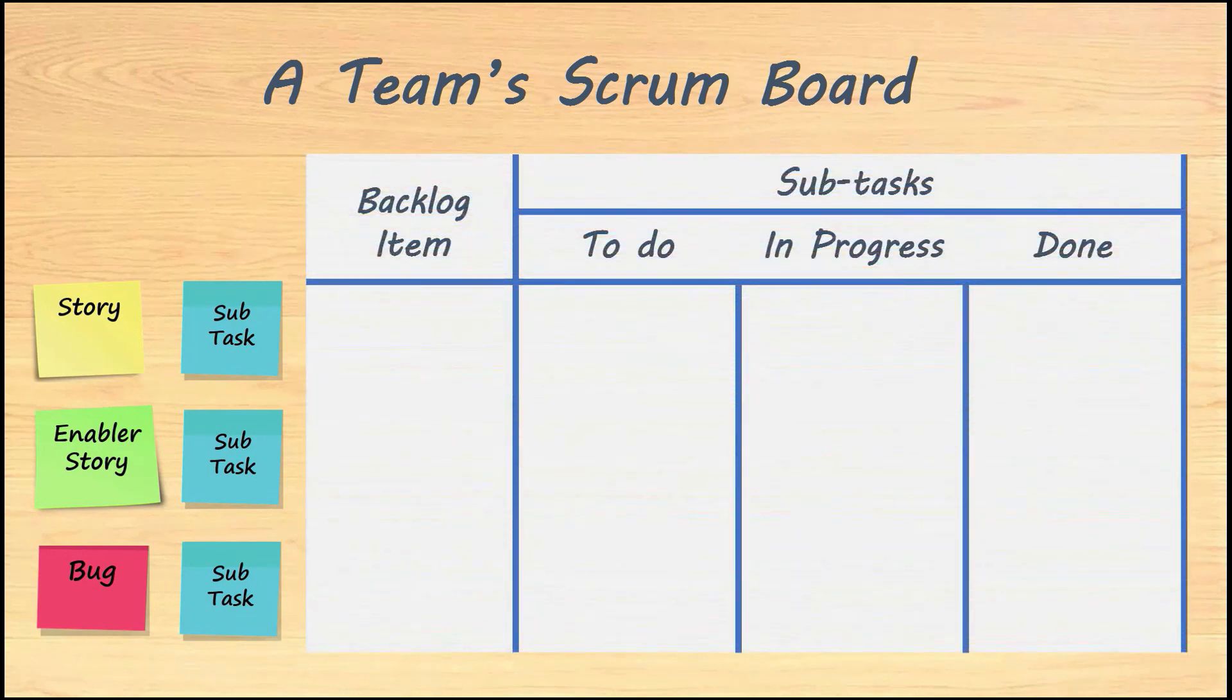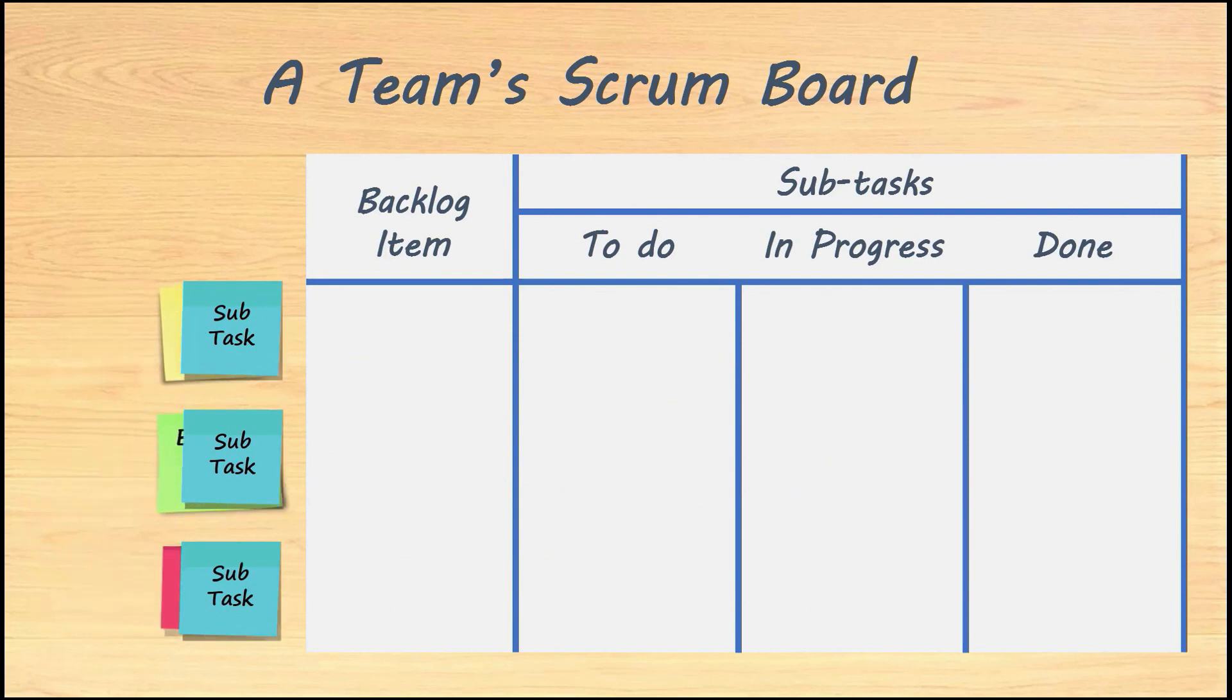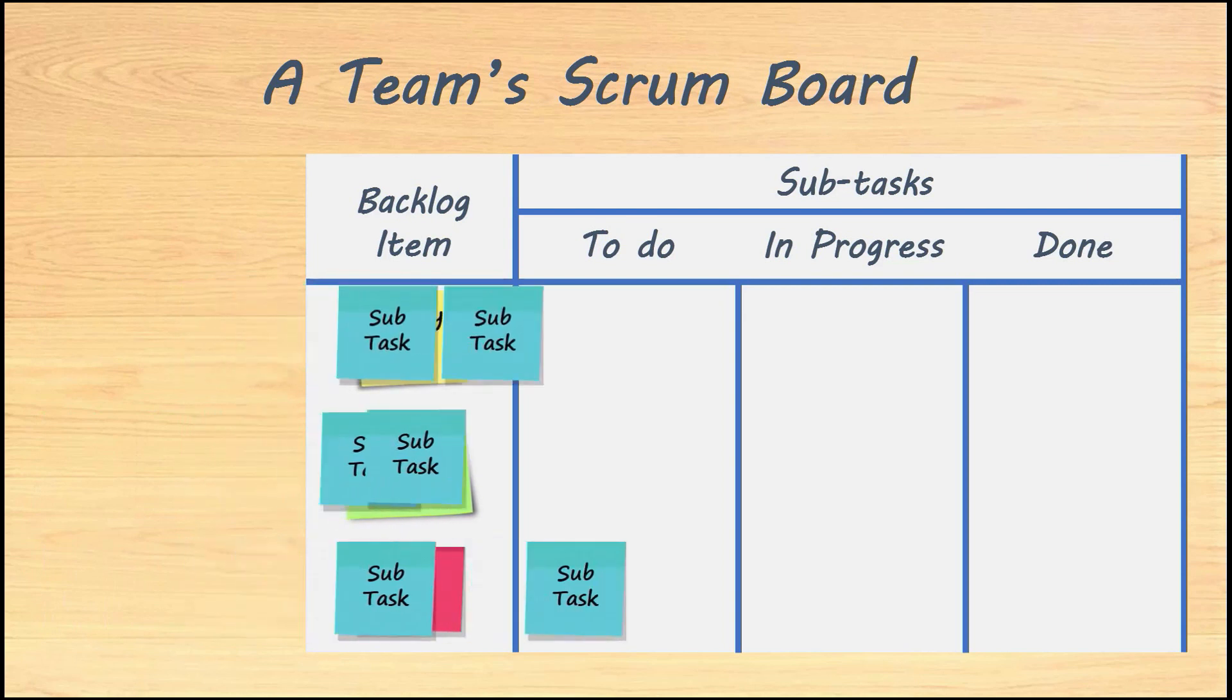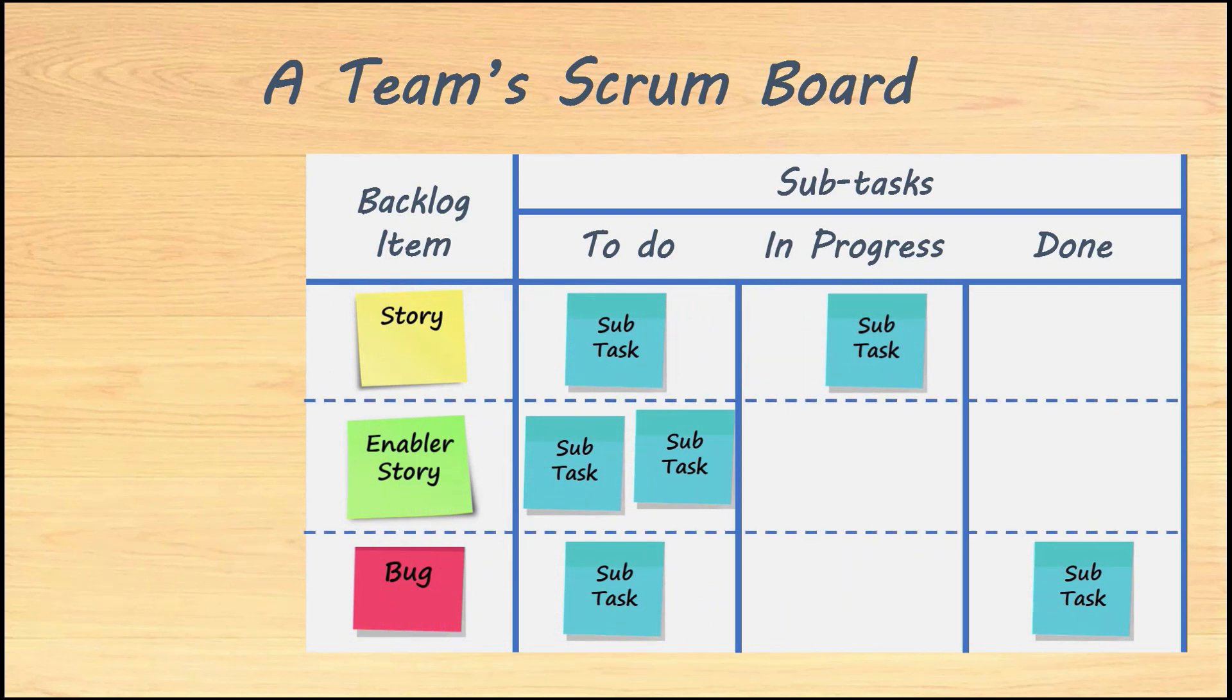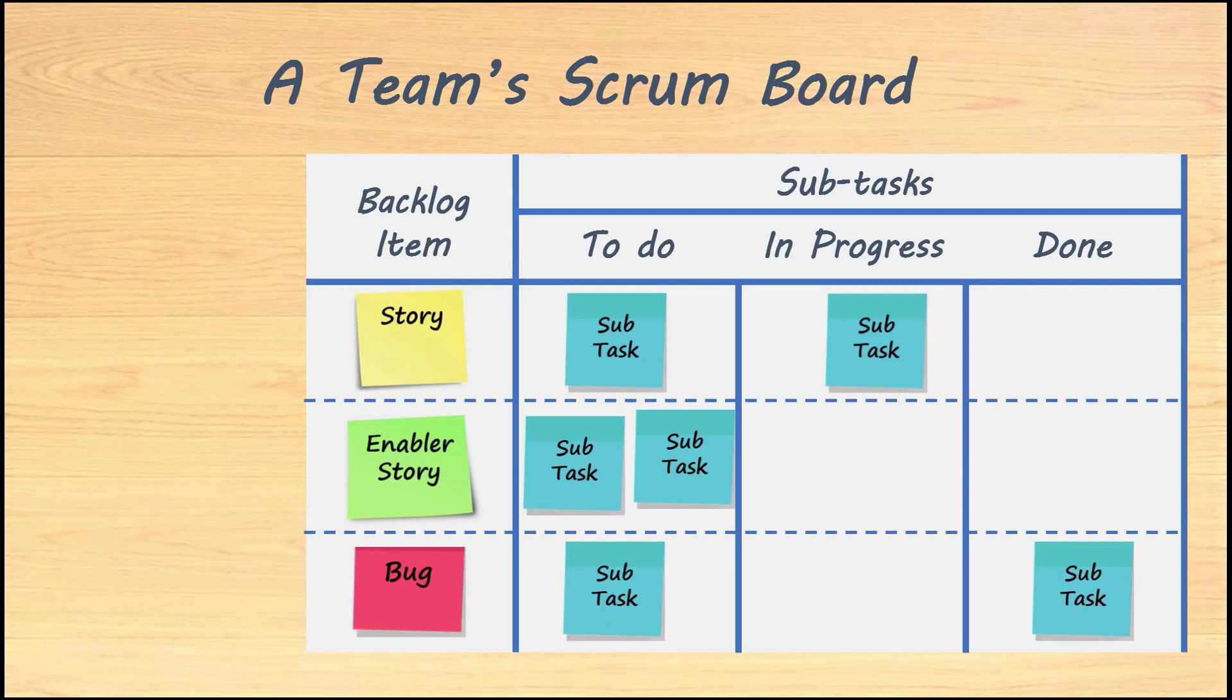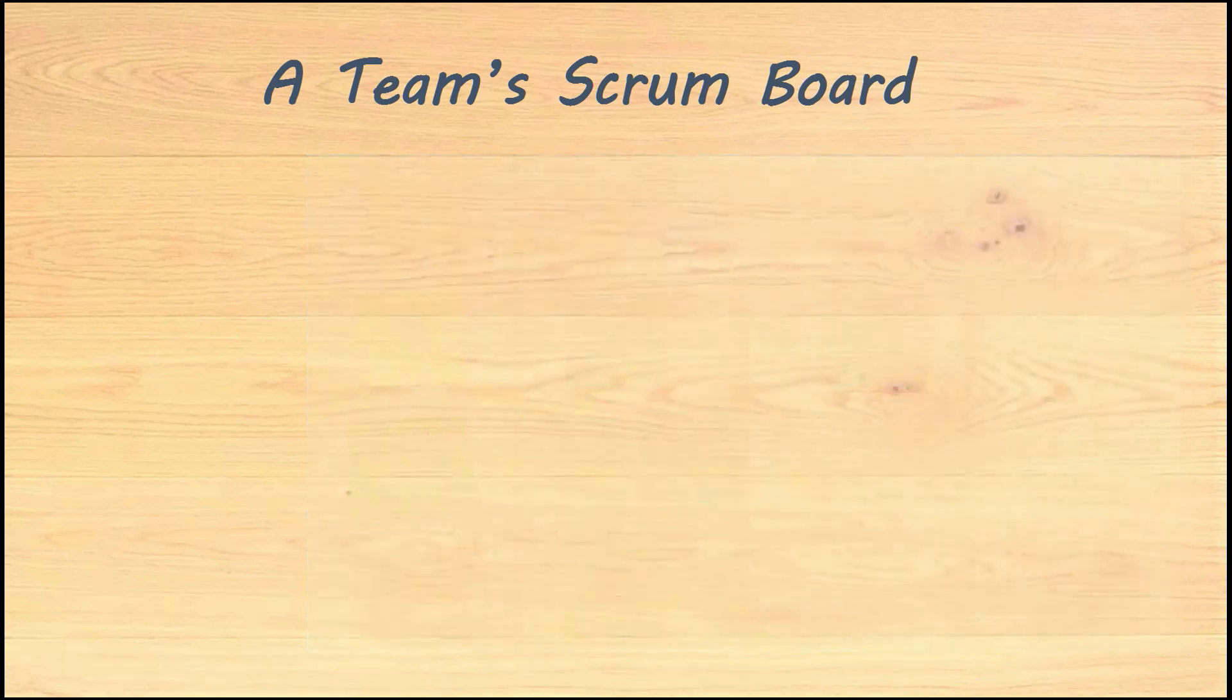A typical scrum board focuses on how the team's work evolves, if possible in the context of each backlog item. This is usually represented in a board like this. The left column is where the team has the backlog items they committed to deliver during the iteration, while the following columns represent the life cycle of the subtasks being done in the context of each backlog item. This imaginary streamline is narrowed by each backlog item visible on the most left column. The approach followed by this board makes it perfectly visible the progress of each work item being done by the team for each backlog item, since they only need to take a look on how the subtasks are distributed to have an idea of how much work is left to be done to complete the item. This is indeed a great approach. However, I believe there's a limitation with this board. You can't actually tell in which step of its life cycle a backlog item is, simply because that information is not mapped in the board.